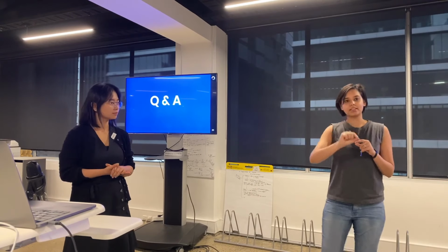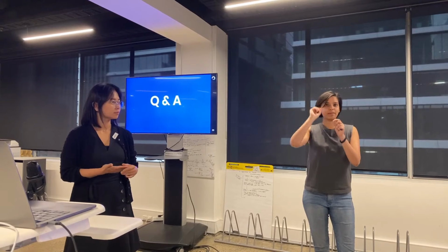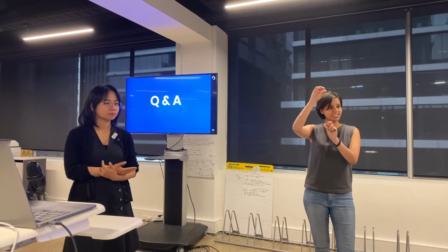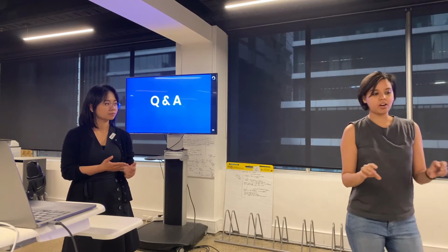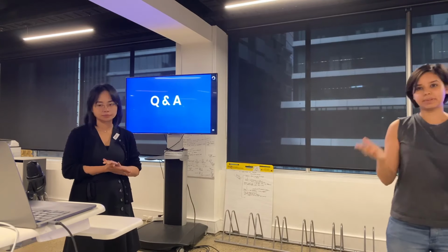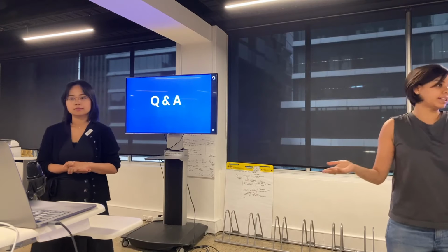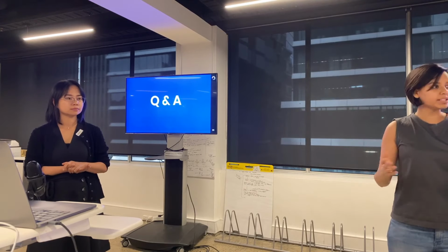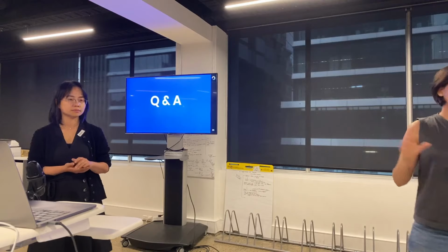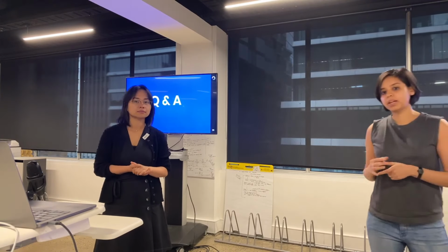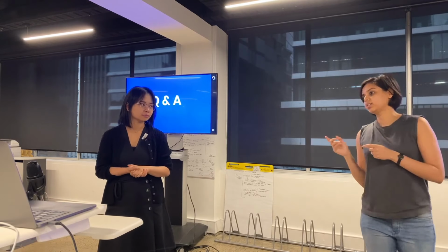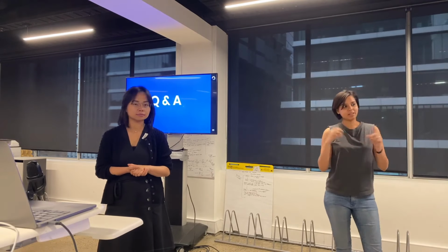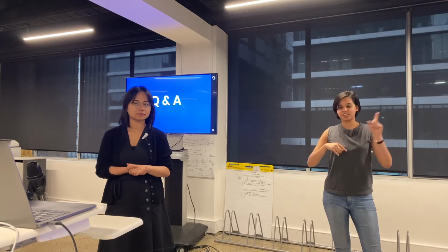And I try to mark the dependency by putting a thread between the two stories, showing that this is dependent on this, and also post any timeline by when the story that the other team is working on will get done. So there are thousands of ways. This is what I do when the team is all co-located. If the team is sitting in different places, in different geographies, I use Jira's tagging mechanism and tag them separately.